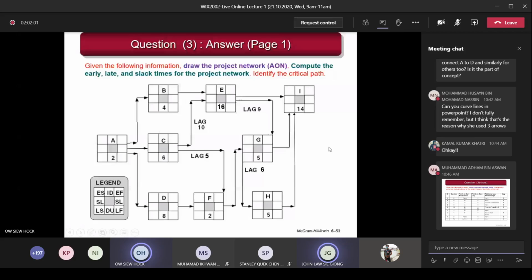Before I you have E and H. Can you see? Yep. Okay. So E go to I, no value. G go to I. This one supposed to go here, but because there's no space, I cannot put all here, I just put here. So this one go here is also no value. So just finish to start. The moment finish E, you start I. The moment finish G, you go and start I. The moment finish H, go to start I. Understand the last row? Okay now?